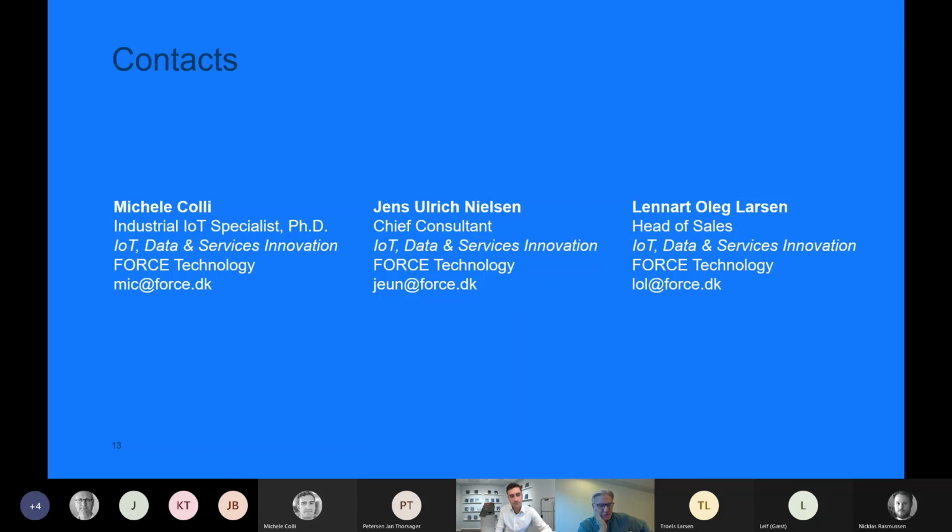Well, Michele, actually, I wasn't talking about the Industriens Fund program. I was thinking about a digital factory mapping project in a company in general. If it's a normal digital factory mapping project in a company, we saw that usually the time companies have to put into that is about 50 hours. So we expect more or less 50 hours to be invested to attend the awareness seminar in the beginning, to provide us with the information and the data during the analysis, and to attend the debriefing in the end. So yes, about 50.